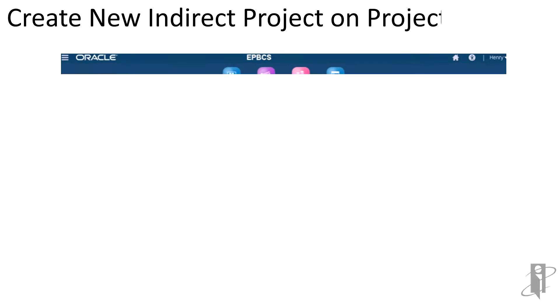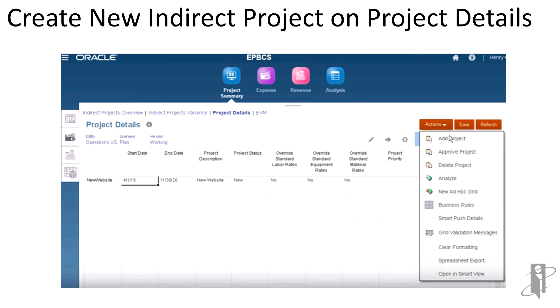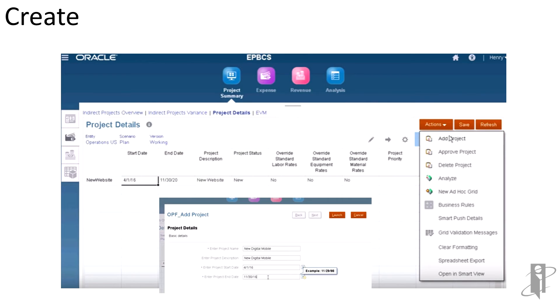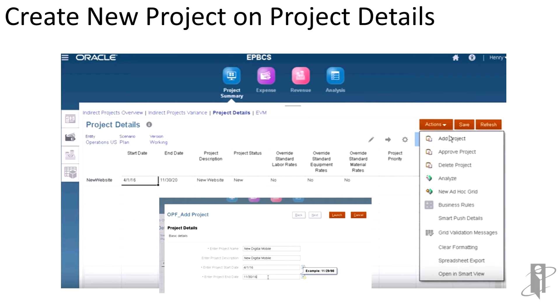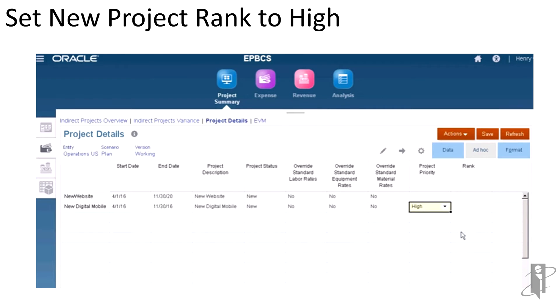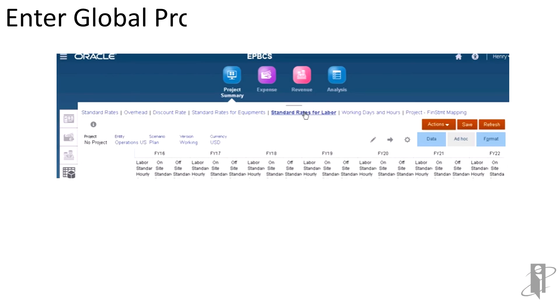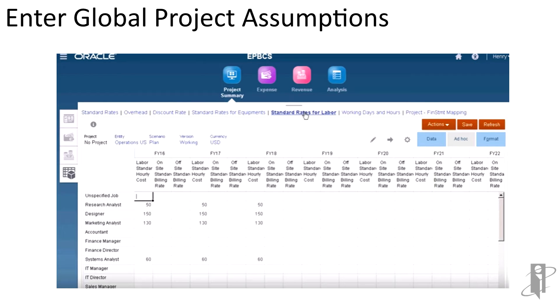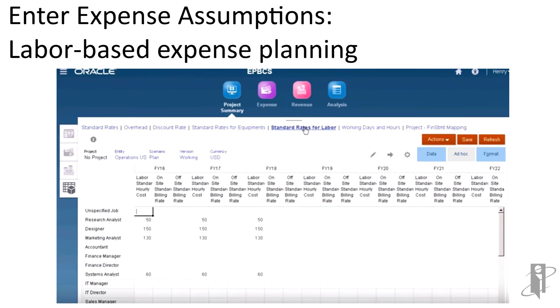So let's say I want to create a new indirect project. I'm going to go up to my actions on my project details form and choose Add a Project. I'll be able to put in my high-level project details — the project name, the description, the estimated start date, the estimated end date. I can give it a ranking, how important the project is to me, and provide some high-level assumptions about the project, maybe some standardized billing rates, maybe some expectations of how many people are going to be on the project and what time frame. I can give it more detailed expense planning based on that labor detail.